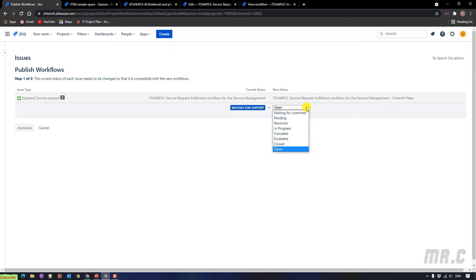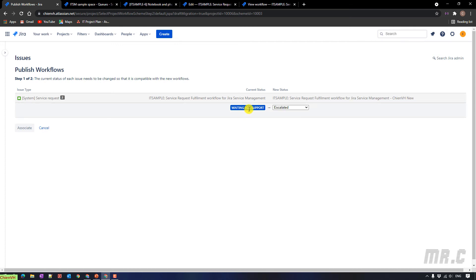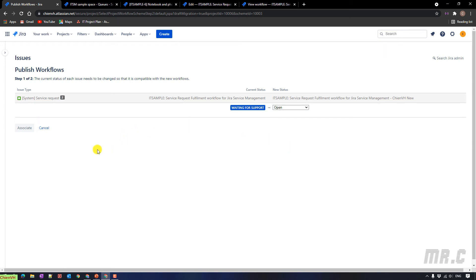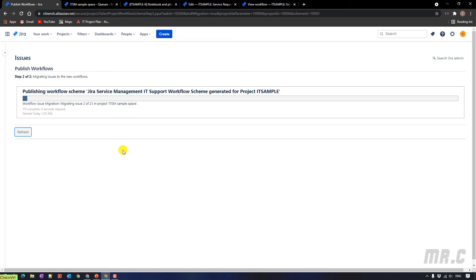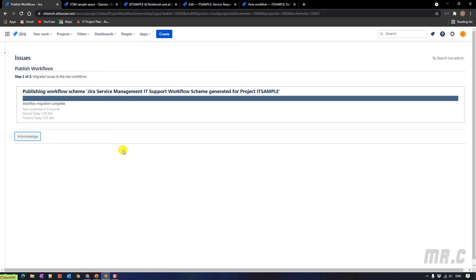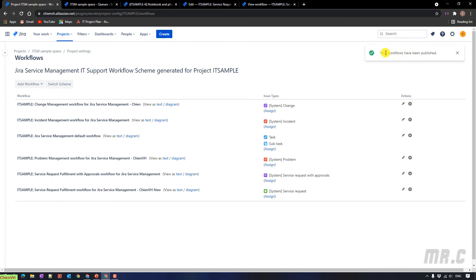The same thing applies if you select another status. For example, if I select 'escalated', then all 'waiting for support' tickets would be changed to 'escalated'. So here let me select back to 'open' and then click on 'associate'. In step two, it will migrate the current tickets to the new workflow. Depending on how many issues are in your project, it may take more or less time. You can see the workflow migration is already complete — click the acknowledge button.